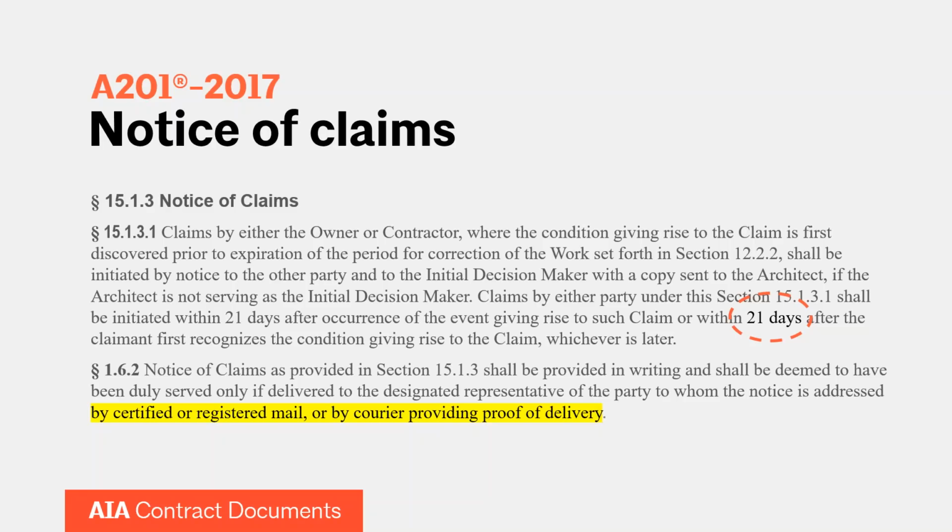I actually read, there's been a lot of articles out there in the construction world over the last couple of days, particularly about how to deal with coronavirus issues that the contractors and architects are facing. I read a really good one from a few attorneys over at Picard and Abramson, and they talked in their article about documenting costs and how to document those costs, extras and overruns due to delays, and really to create a couple of different buckets for all the expenses that you're incurring on a project. What are the things that are very specific due to delays, and what are things that are just kind of your normal costs that you would have incurred anyway? So make sure you can break those things out appropriately when the time comes.